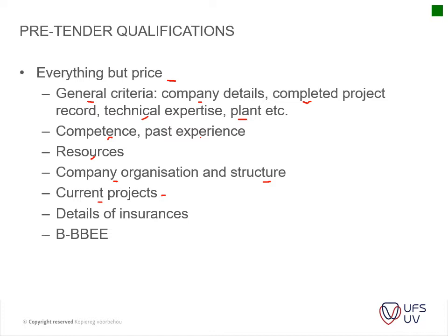What you try and do from the consultant side, obviously the contractor will say that he does have the capacity, although you will have to check whether that is the truth or not. So a bit of background checks and phone around a little and find out. If you're in a small community, like for instance in Bloemfontein, it is easy to know what the commitments are of certain contractors also, if you've built up a bit of a relationship with them. And then you've got details of insurances. Do you have the necessary insurance in place? Is your BEE status in place? Your CIDB grading? All of those technical items.